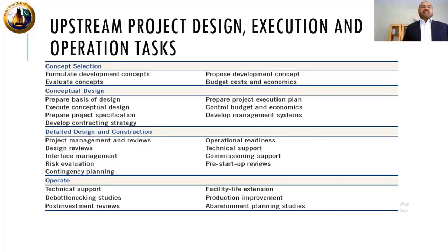So this is the phase where pre-feed starts, and then detail later on. They go into the feed phase where project management and reviews, design reviews, interface management, risk evaluation, contingency planning, operational readiness, and technical support all come in, along with commissioning support and pre-startup review. So all these things go into the feed and the detailed design. Later on, O&M and operation readiness activities start in parallel to all these activities.